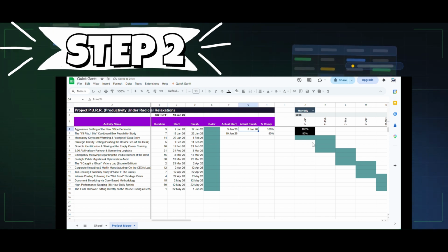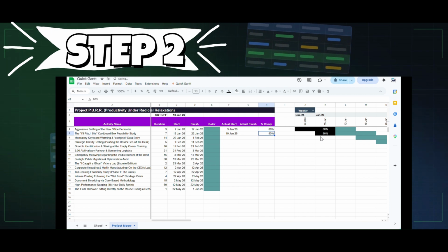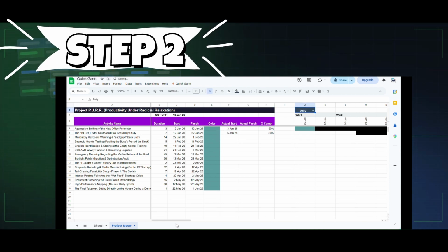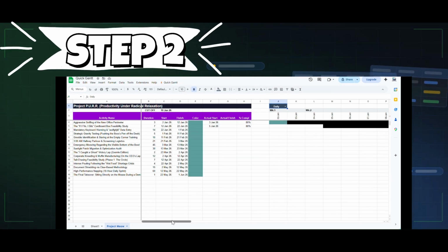First, let us change date to Jan. Set Comfortable View and adjust the percentage complete. As we change the start date, the black bar moves accordingly. The black bar is the actual bar with percentage complete at end.